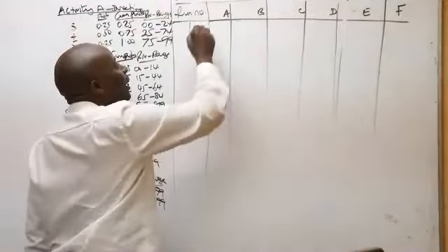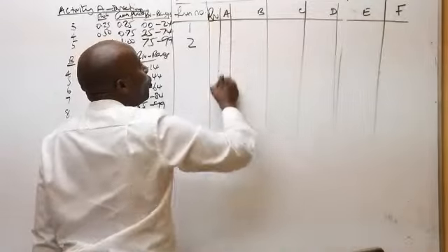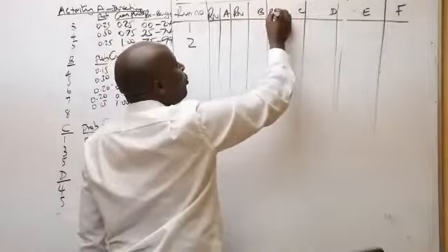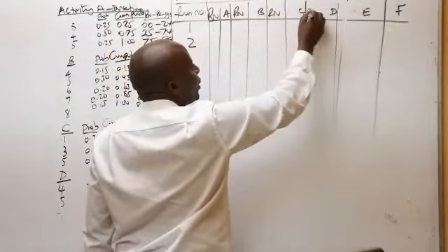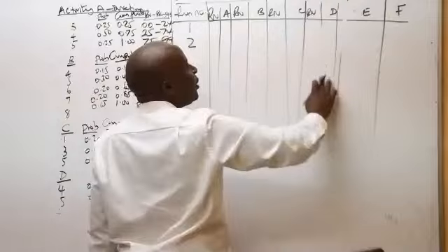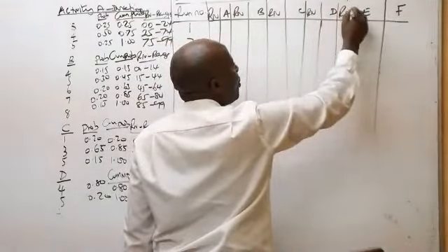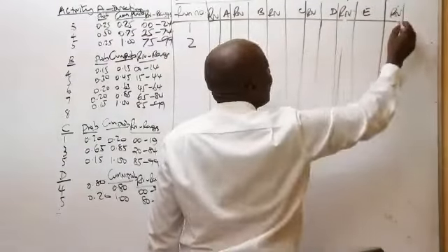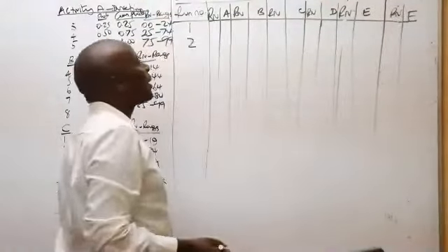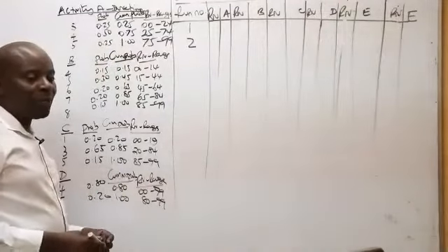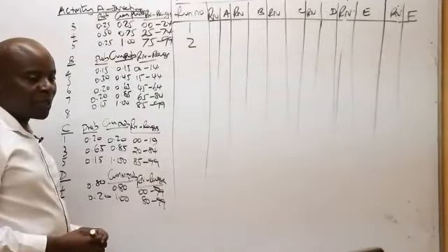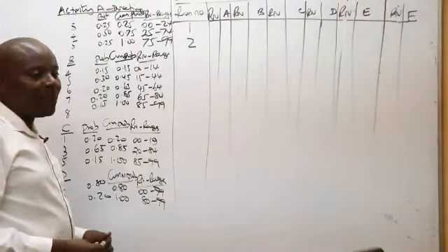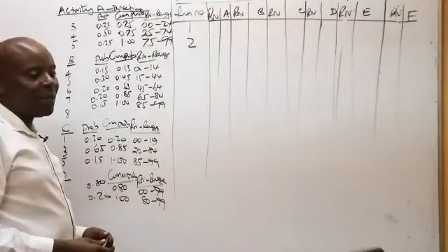Using the random numbers that the examiner must always give you. Use the random numbers which the examiner must always give you to predict each duration there. Each duration has to be predicted using Rn. Rn, if you're taking notes, means random numbers.